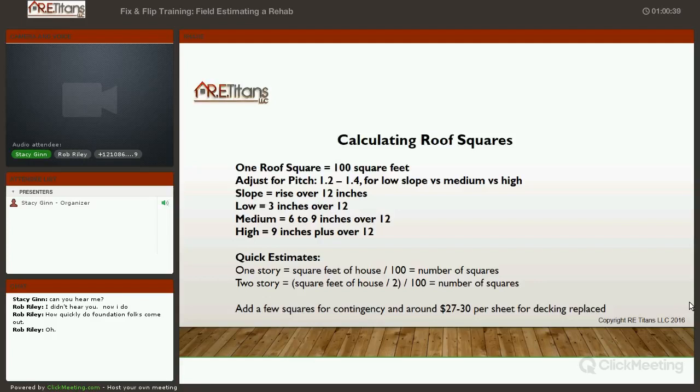But like I said, the point is that it's a box on a lot, is what we called it in new home building. Basically you've got four brick walls and they're all pretty much the same, and it's not like you're one and a half stories or something like that. You just have a double decked house, and if it's a 2,000 square foot house, well, your roof is only going to be calculated on half of that, so you would divide it by two and then multiply for your slope and everything, the roof pitch.